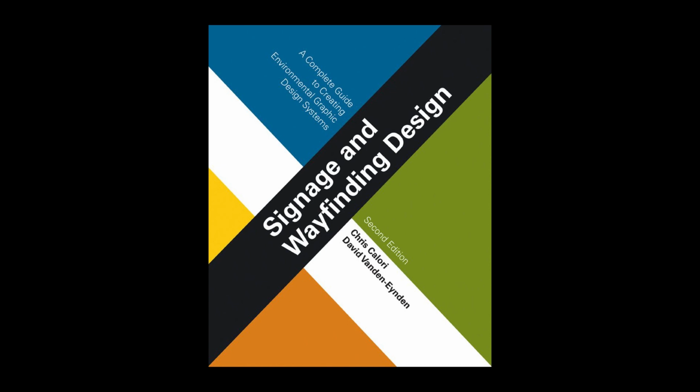Additionally, drawing reference numbers are entered into the message schedule as final drawings are generated for the sign graphics and hardware. This work is very tedious because each sign needs to have its own unique number, and that number needs to be the same on both the sign location plans and the message schedule.